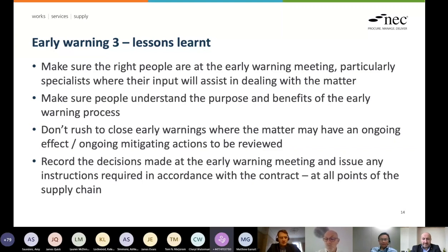I just think from my side as the client, it is important to remember that the client in character here waded in and said, oh, what's going on? This is a claims meeting. Paul had a similar approach when he came in as a subcontractor. This is commercial. In my experience, that's not what early warning meetings are about. It is very much, as Paul said in his summary, about getting the specialists together, discussing the issues, trying to resolve it as best you can under the circumstances, and then the commercial and the program impact are almost secondary, aren't they? Clearly they're always a consideration, but they're not driving these types of meetings, are they?